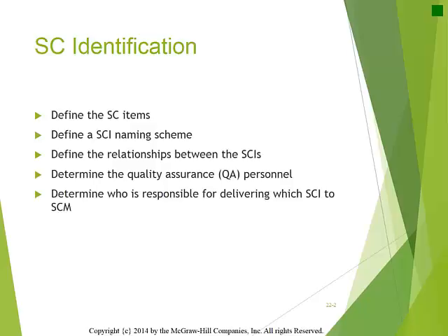Software configuration items may affect other software configuration items due to association, such as an aggregation association or an inheritance association. For large projects, associations between configuration management items should be modeled. For example, when a use case changes, the sequence diagram derived from the use case should be updated. If a use case is deleted, its sequence diagram should be deleted.